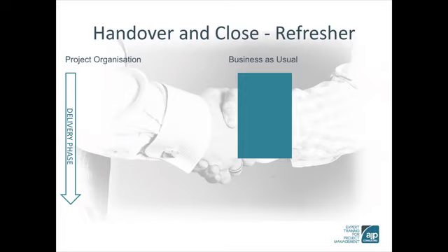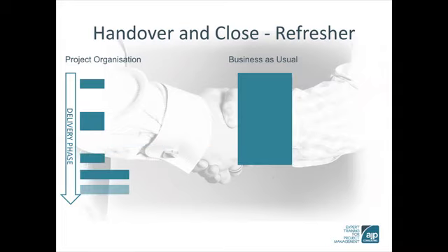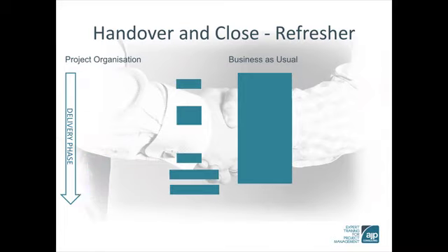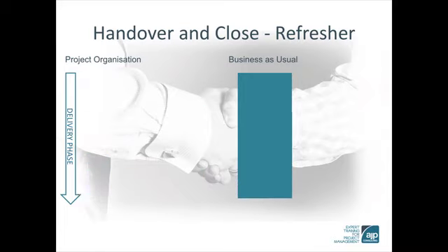Handover is the phase or phases of the project lifecycle where deliverables are transferred from the project organisation to business as usual. Deliverables can be transferred as soon as they are complete, or aggregated together and provided as one set of functionality or capability.